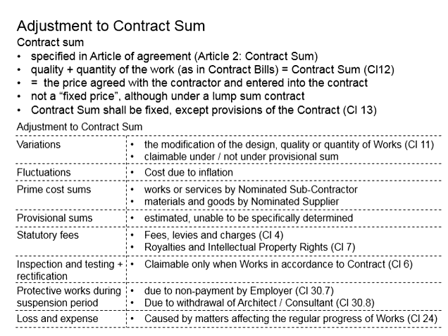Some of the testing may be destructive, for example, doing some coring in order to acquire samples of concrete. After the inspection and testing is done, ratifications will be required. Now the relevant cost here shall be claimable, and therefore adjustment to the contract sum is allowed.